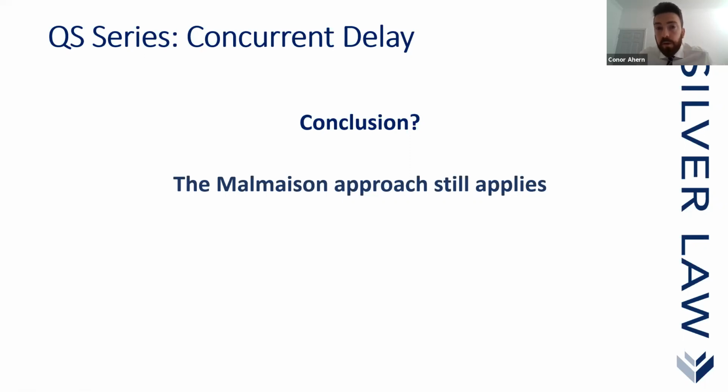If you come across it on any of your projects, the conclusion in this section is that the Malmaison approach still applies. Malmaison confirms that the relevant event entitles the contractor to a full extension of time for the period of that delay. That's also what's been confirmed in the case of Walter Lilly versus McCoy, from 2012.